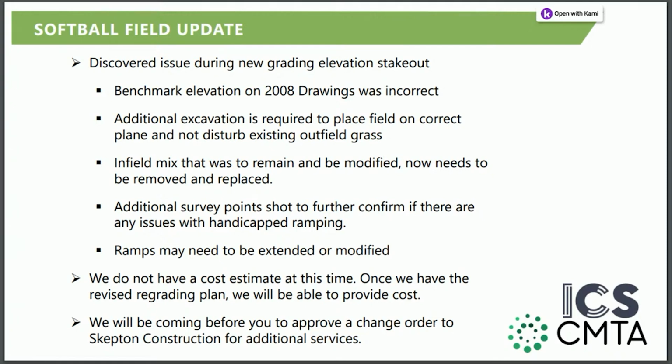Originally, the infield mix was scheduled to remain except for that outer blue area, and we were supposed to incorporate a conditioning mix into that infield. Now we are going to have to replace some of that infield mix. We are going to harvest what we can and set that aside and try to utilize that back in, but we are going to have to get more infield mix than what we originally intended.